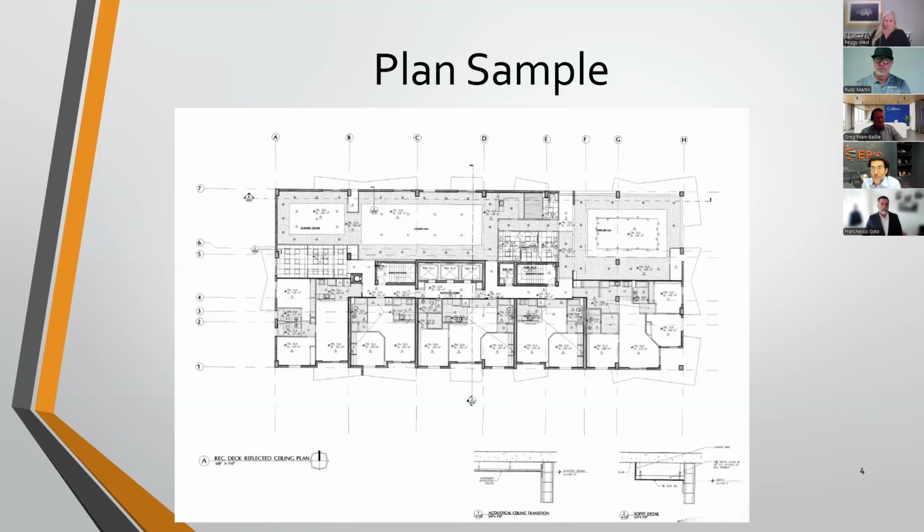Okay. To someone that may not know a whole lot about this, they might say, all right, well, that sounds really cool. How much is it? Can I afford it? I don't know. Let's go ahead and bid it out. Alternate 1, alternate 2, alternate 3. But you are utilizing that bidding process to obtain numbers from multiple vendors, as opposed to being married to a singular vendor halfway through a project, and you don't really have much of a choice if you want to make a move or make a change there. So the bidding phase alone is very critical.